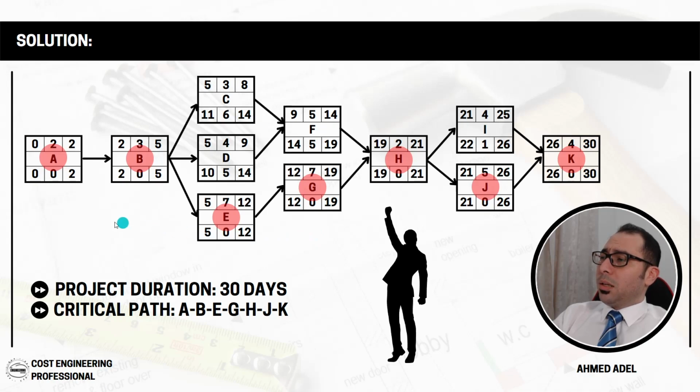So we can see here, this is what we have done so far. We can understand that the critical path, as we said, is a sequence of activities. This is the longest sequence of activities that cannot be delayed at all, because if any of the activities on this sequence are delayed, it will delay the end of the project. The activities on the critical path are critical activities because if they are delayed, they will delay the end of the project, and that's why the float here is, as you can see, 0. So this is what we get from doing the CPM.